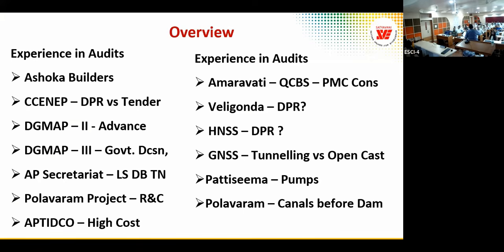So at your risk and cost, we award your leftover work to another contractor. That means any increase in the cost I recover from your performance. So we encash the performance guarantee first and keep that as a deposit, as an additional thing. Additional expenditure made to complete that work is recovered from the original contract, only the additional cost.